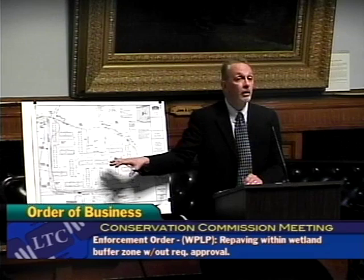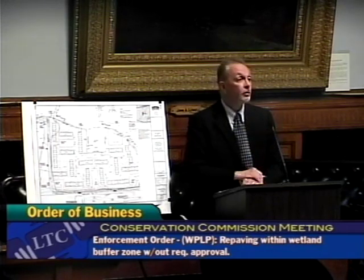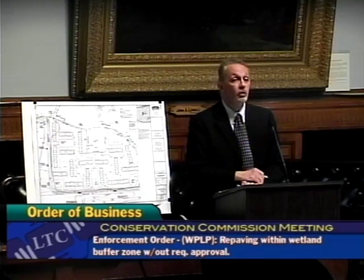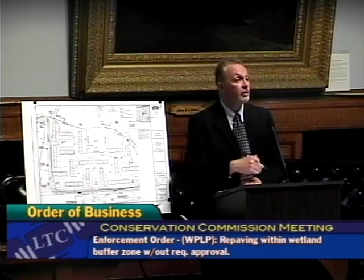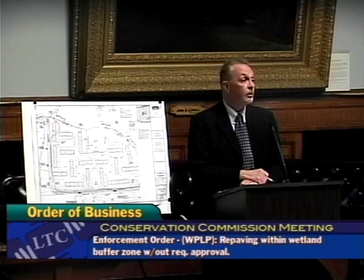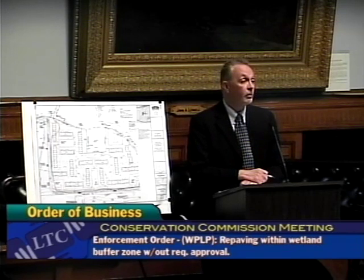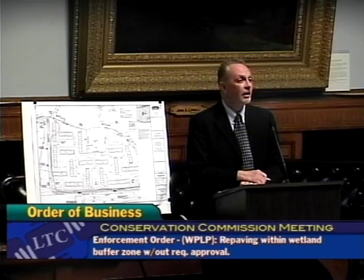and the drainage portion of this and the calculations that engineering needs is complete. We wanted to have this discussion with the commission this evening to make sure that we're on the right track. We very much appreciate the additional concerns that have been expressed here so that we can incorporate those into the formal filing. But that shouldn't take us too much longer to do now. Implicit in your presentation, and believe me, it didn't escape me, was the last 150 feet. And you didn't ask, and I know you want to ask whether you can finish it. Our understanding is until we get an order of conditions in response to the NOI, we don't do that work.